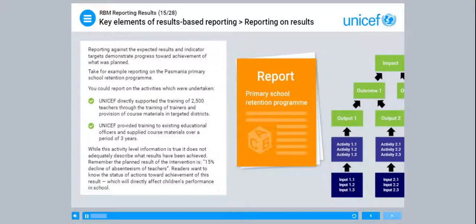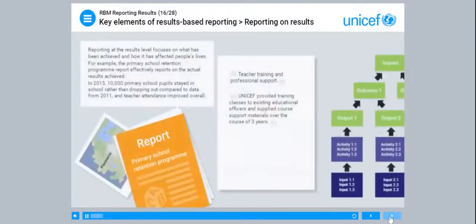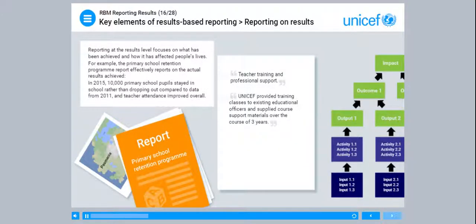Report against the expected results and indicator targets to demonstrate progress toward achievement of what was planned. For example, reporting on the PASMANIA Primary School Retention Programme: you could report on the activities which were undertaken — UNICEF directly supported the training of 2,500 teachers through training of trainers and provision of course materials in targeted districts. While this activity-level information is true, it does not adequately describe what results have been achieved. Remember the planned result is a 15% decline of absenteeism of teachers. Readers want to know the status of actions toward achievement of this result, which will directly affect children's performance in school.